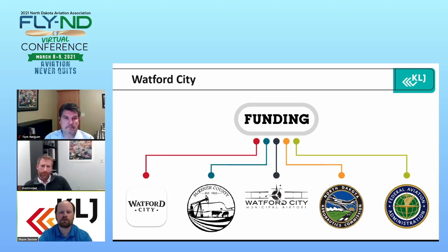And going to working with the city, Luke Taylor, the airport manager, and Kent Norbeck, the chairman, did a fantastic job with their finances, getting their books in order, and then also working with the city and the county. The airport wasn't going to be able to fund the local share on their own, so leveraging the county and the city and doing that early on was huge. And I would assume if we ask Luke and Kent, that early engagement with those two local entities was huge.